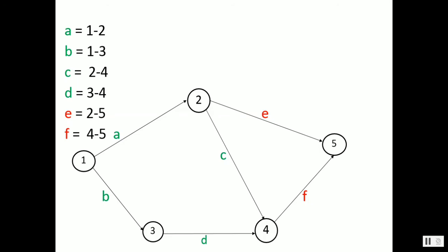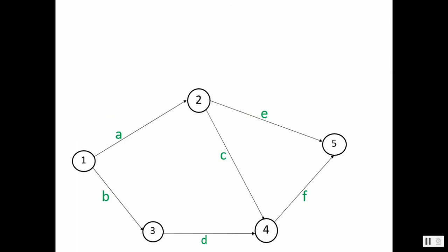It clearly means that the activities preceding event 5 will merge together at event 5. So we will have the network diagram constructed like this: A, B, C, D, E, F, 1, 2; 1, 3; 2, 4; 3, 4; 2, 5; and 4, 5. Eliminating the upper left portion of the information, we can have the diagram like this.